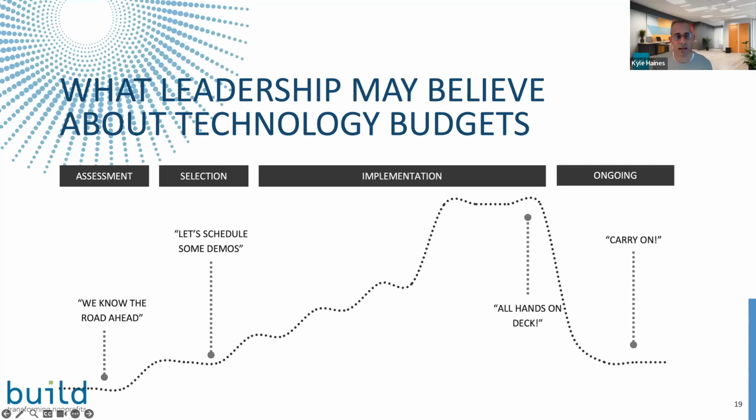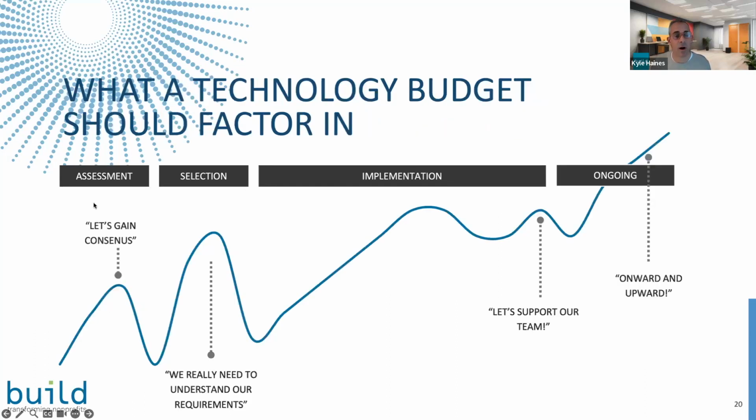Usually leaders understand that as the implementation progresses, there is going to be greater investment of money, of staff time. It might involve staff augmentation to support staff as go live begins. But there's this misnomer that once go live happens, that investment can tail off and that the investments that are required will be minimal post go live. This is closer to what the reality is on successful enterprise-wide technology projects.